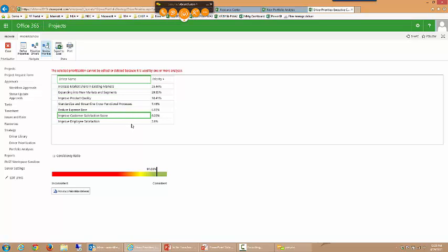In other words, you didn't say something like A is greater than B and B is greater than C, but A and C are equal. That wouldn't be mathematically consistent. Okay, so when you get a lot of drivers, and once you get up to say 6, 7, 8, 9 drivers, it gets a little bit more challenging to keep a high consistency ratio, but you're going to want to make sure that you do have that high consistency ratio.